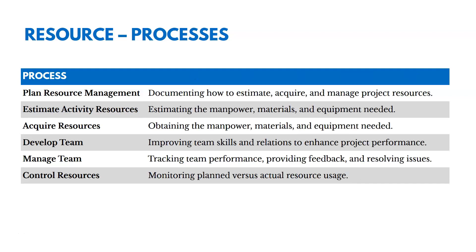With plan resource management, we're documenting how we're going to estimate, acquire, and manage the resources — how we're going to do it. Then with estimate activity resources, we're estimating the amount of manpower, materials, and equipment that we need.